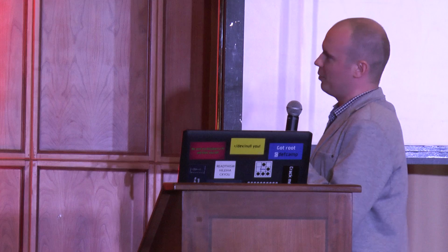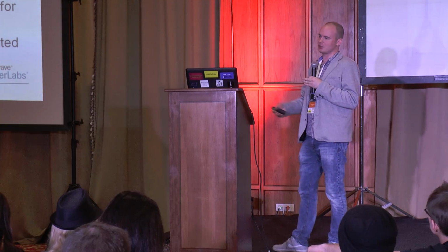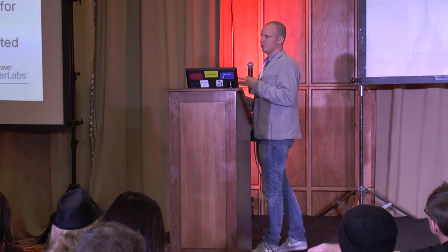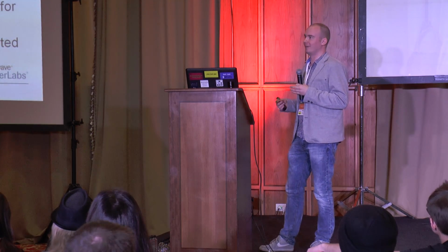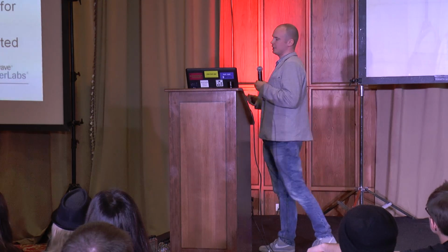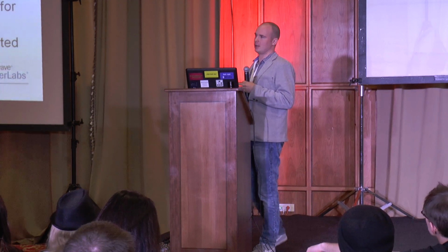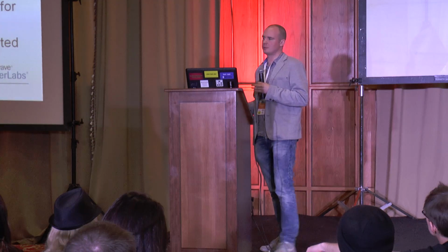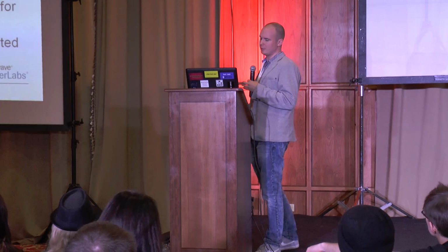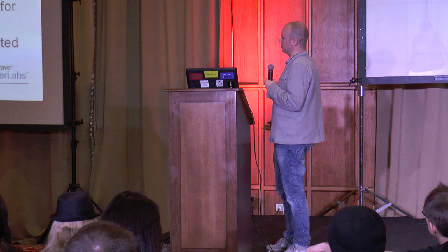The third one: do you have a moment, I need a pen test? Project managers love this kind of stuff. Like, I need to do a pen test, and the application is going to production in 1 week, so we need like 2 days to fix the findings that you've got, so 3 days is enough or not? No. The problem is that the people that arrange the schedule for pen tests sometimes do not know that it is time consuming. Of course, it all depends on what kind of application it is and how big it is, because sometimes web applications are really, really big. And you also need to remember that an attacker that tries to hack into your operation has an unlimited amount of time.